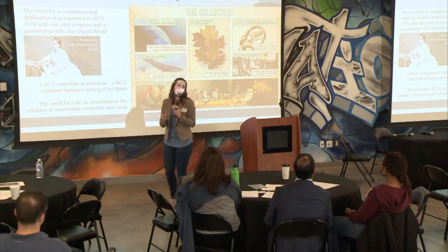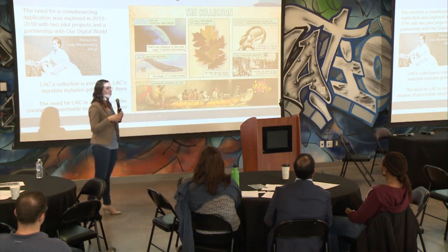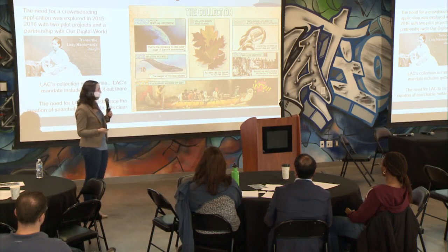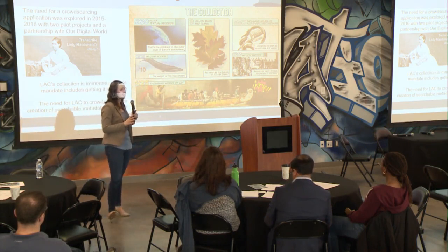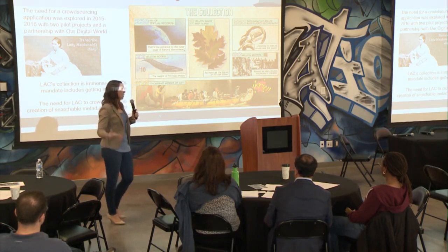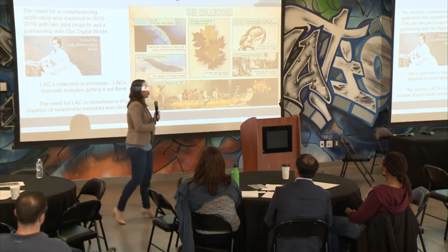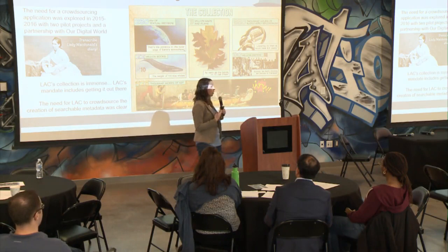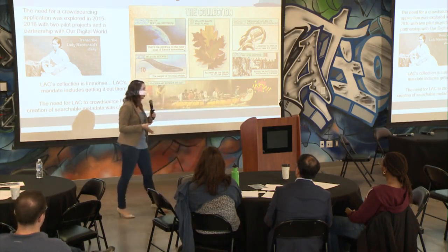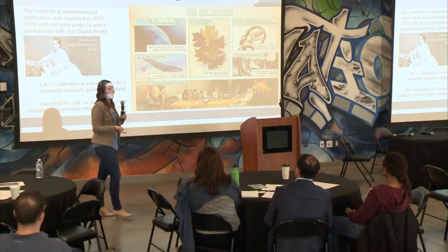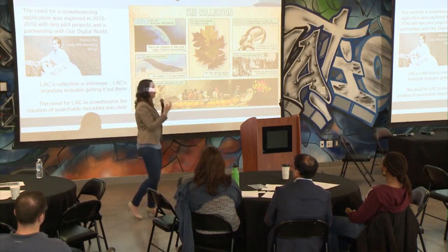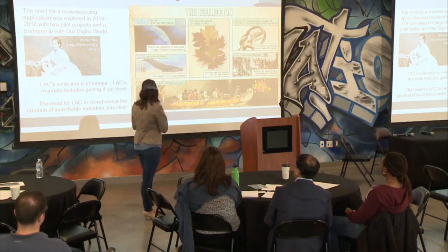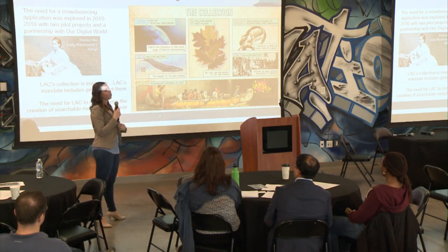We launched it, I believe, in July of 2015, and we planned on doing a communications push in the fall. This was very, very much a pilot, so we were planning on doing the communications push in the fall, but we didn't end up getting to use all those communications products because it was done in 6 weeks. So the public just jumped in, there was this huge interest, and within 6 weeks, the entire 400-plus page document was transcribed, was tagged, and there was all this metadata that we could then turn around and make available in our collection.